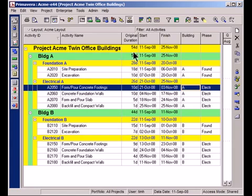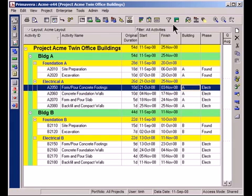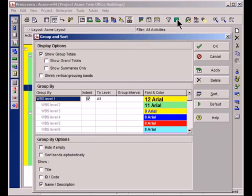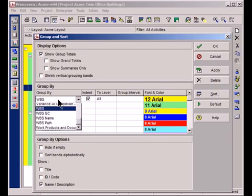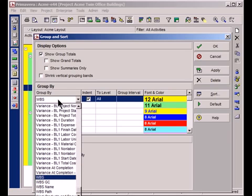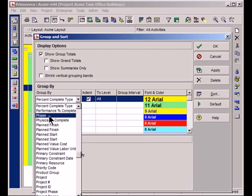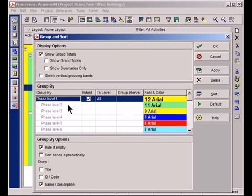The next step is to actually use these group and sort bars, these yellow and green bars, so that I can reorganize the project taking into account these activity codes. I'll go up here to this green icon. This is my group and sort configuration button. You can see right now I'm grouping and sorting by WBS. What I'm going to do is I'm going to change that. I'm going to first group by phase, so there's the word phase. Great. Turn off this indentation.